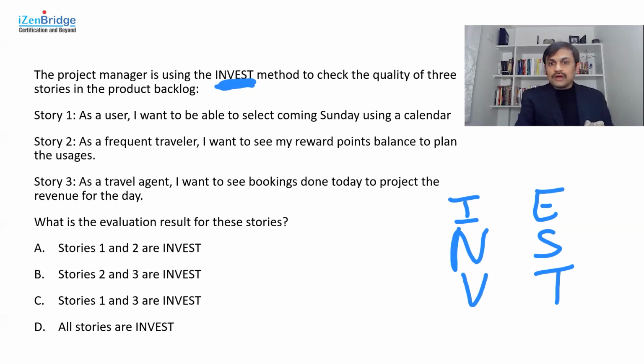So user story one is clearly showing some gaps. First, it is not talking about who this user is. It is giving a very generic definition of "as a user". Now, you may find some content where it is still written as a user, but usually we should talk about who that user is, like a frequent traveler or a travel agent, a particular user persona or a user group. So we talk about a little bit more detail about who is using it.